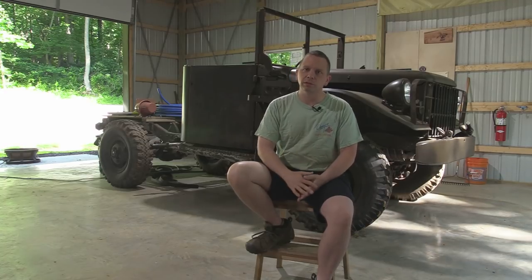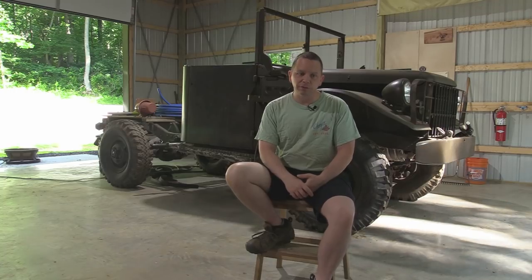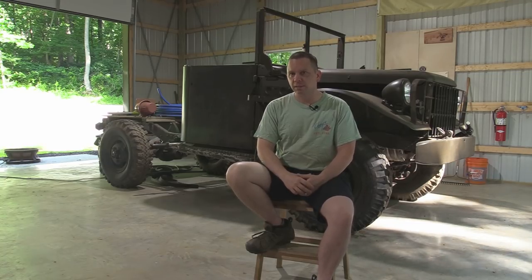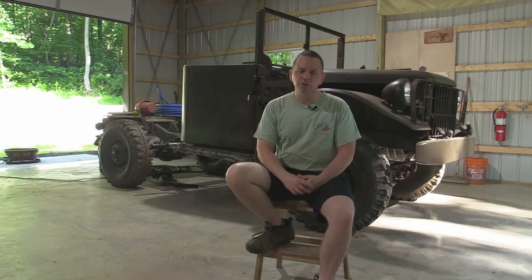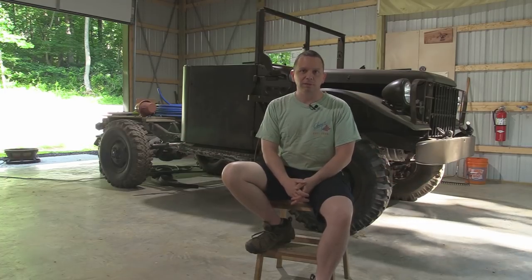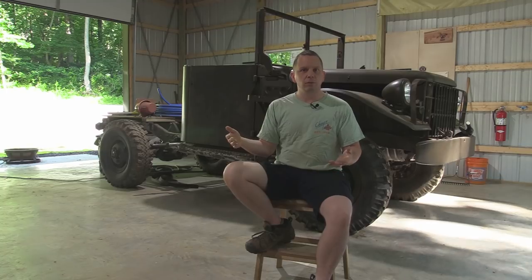And also, I had said this earlier in the video, if you're gonna tackle something like this alone, you have to have some kind of heavy machinery access to it at all times. Because you never know when a load of dirt is gonna be delivered or you're gonna have to pick something up or move something across the yard. And for too long, I tried to do this stuff by myself. And you just spend hours trying to engineer some way to move the thing when really it should take like 5 minutes. So don't underestimate that part of it either. Just build it into your budget, some kind of a tractor or a skid steer or whatever.